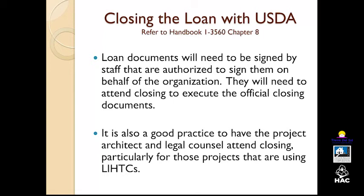And the sources and uses budget should be updated regularly to help you track whether you're going to have any excess funds in a project, which would be nice, or if there's any cost overruns that would need to be paid. As project sponsor, you're required to make sure that there's funds available to pay any cost overrun. So it's really important that you monitor all of that very carefully.